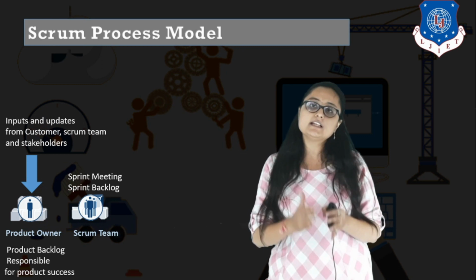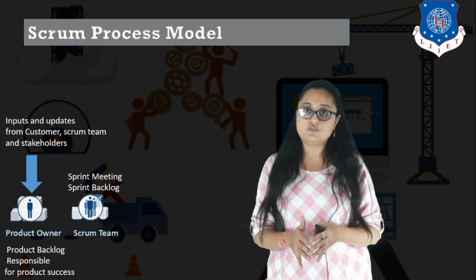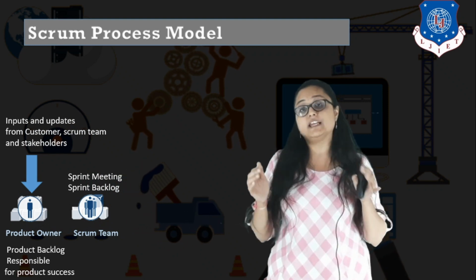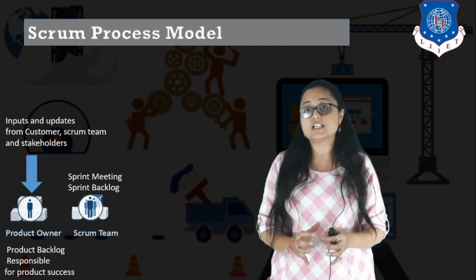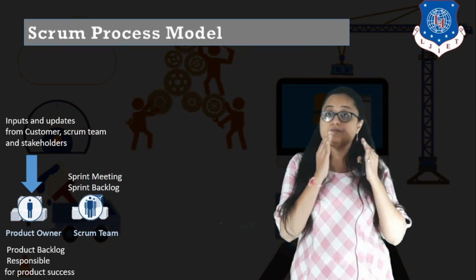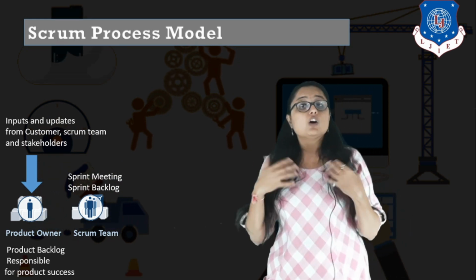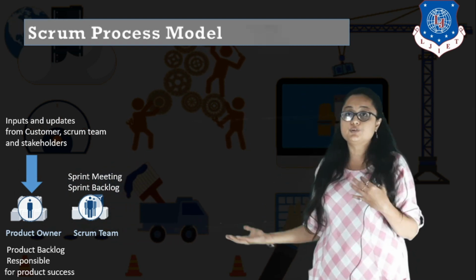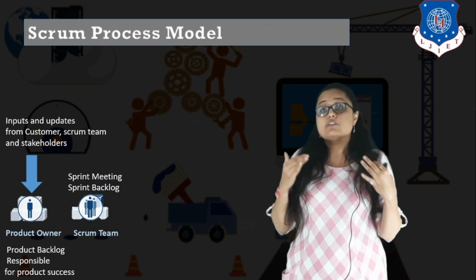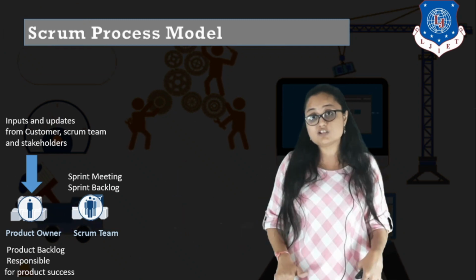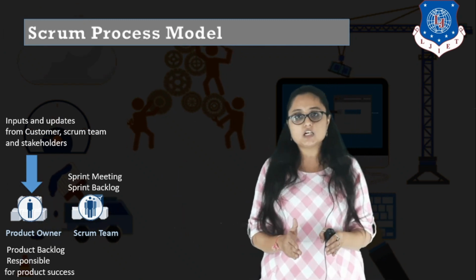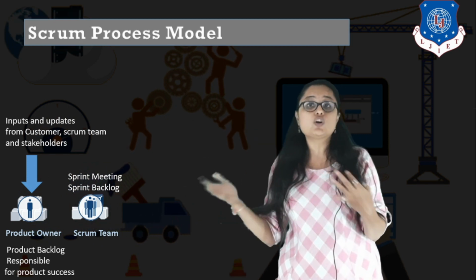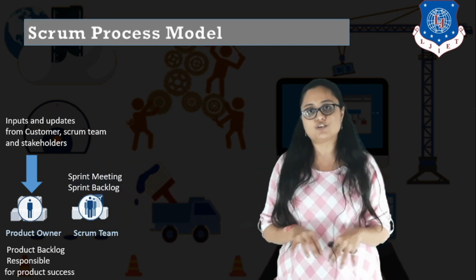Okay, so a sprint is nothing but all the requirements that you are going to implement currently, and the duration is very tight because a time-boxing strategy is used in the sprint, from 1 week to 4 weeks. Now you may wonder, ma'am, if in between the sprint there is some new requirement to be accommodated, will we accommodate that in between the sprint? No. When you are in a current sprint, you are not going to accommodate any new requirement or update in the current requirement list of the sprint.